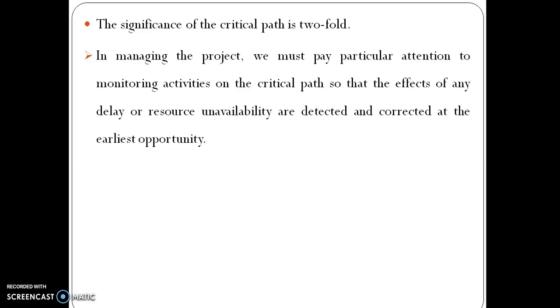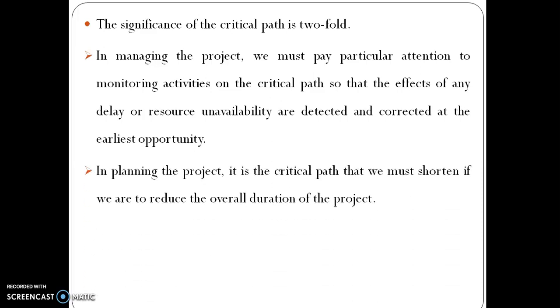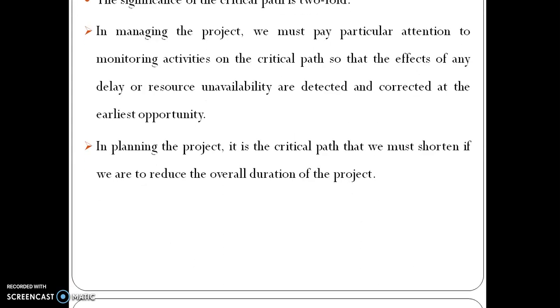The significance of the critical path is twofold. In managing the project, we must pay particular attention to monitoring activities on the critical path so that the effects of any delay or resource unavailability are detected and corrected at the earliest opportunity. In planning the project, it is the critical path that we must shorten if we are to reduce the overall duration of the project.